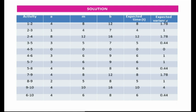So far we have been using just one time estimate per activity, but in PERT we use three time estimates — the optimistic time, the pessimistic time, and the most likely time — and combine all three to derive the total estimated time for each activity. We also need to calculate the variance associated with each activity using the formula derived from the normal distribution.